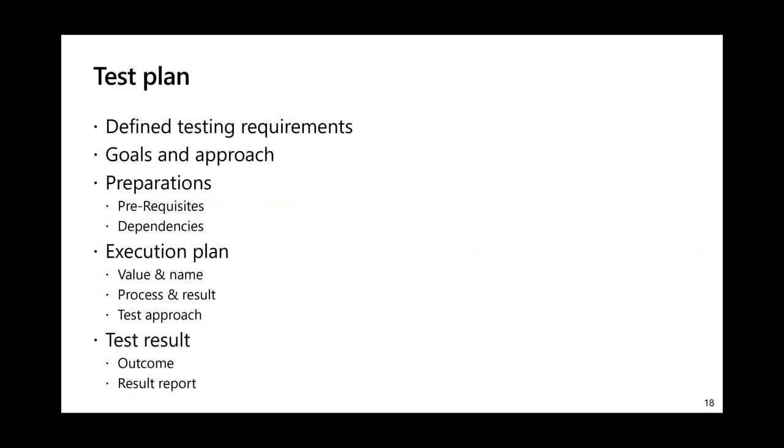As I mentioned in the previous slide, in my test plan, I have defined the testing requirement, the background, and the defined scenarios. We should always provide more detail in the testing requirement in the test plan to make sure the requirement is ready at the end. And I have put in the goal, what I discussed with the SME and key user, writing down their expectation after the day-in-the-life testing result. And for the approach in the test plan, I drafted how to make the day-in-the-life testing a success. What I did in the testing is very important to you before you start the development or set up the environment.